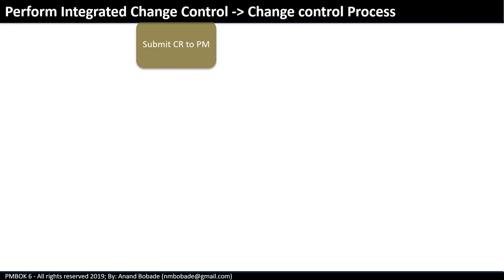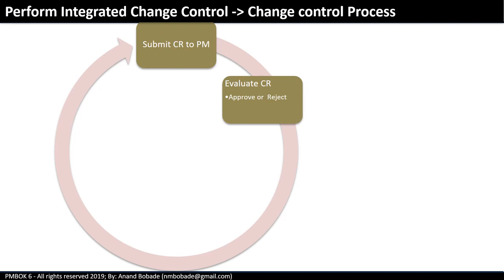Let's see how the change control process works. Note that this is a very generic process — your organization may have a specific process as per your project management methodology. This process is shown here only for illustration purposes. Any stakeholder can submit a change request, either into a change control software tool or as an email to the project manager. The project manager will evaluate the change request — initial evaluation ensures correctness and that all required information is entered. If something is missing, it might get rejected for further work.